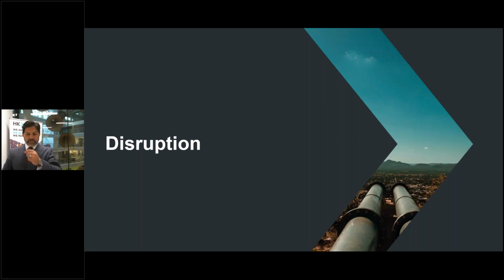So coming on to disruption, it's very important to understand the distinction between claims for prolongation and claims for disruption. The easiest distinction, which a lot of commentators say, is the way that direct and indirect cost elements are priced and paid for in different manners. So the pricing and payment for the actual work is based on the volume of work undertaken. Example, the amount of wall constructed, whereas the indirect costs are on the most part on the basis of time. For example, the duration of the plant being hired, the duration of the welfare facilities, your prelims in general.